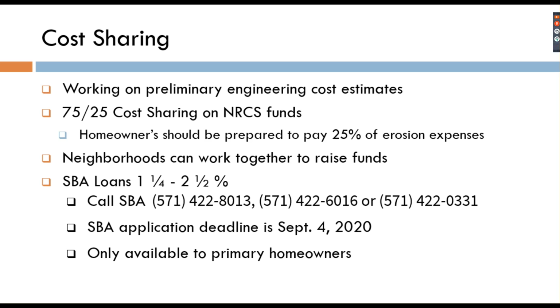What we're planning on doing there is we are putting in cost estimates that are intentionally high so that we do cover the entire project cost. If we do have some leftover funds afterwards, what we'll do is refund that money back to the homeowner. But also, if there are expenses that go over and above, the homeowner, or I should say the property owner, will also be responsible for that funding.